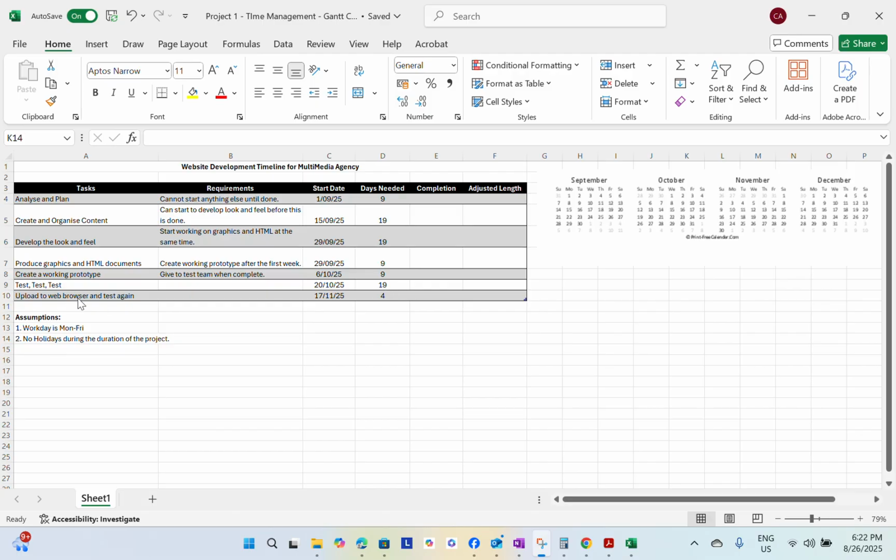And for the last task, we have upload to web browser. So we need to complete first the testing, which is the 20 working days, before we start uploading to the web browser. So that's November 17. We need 1 week for that. So I've added here 4 days.